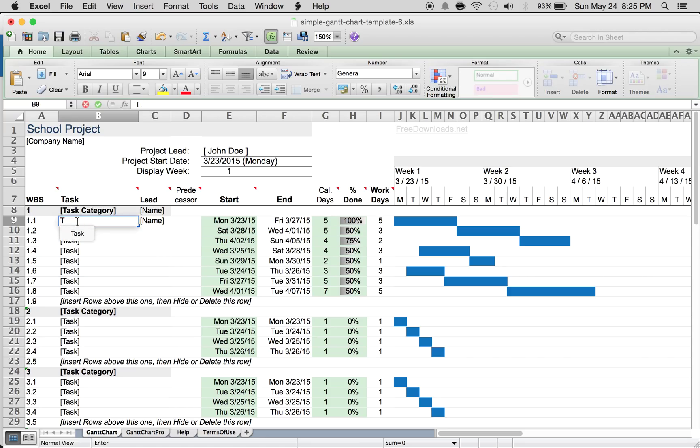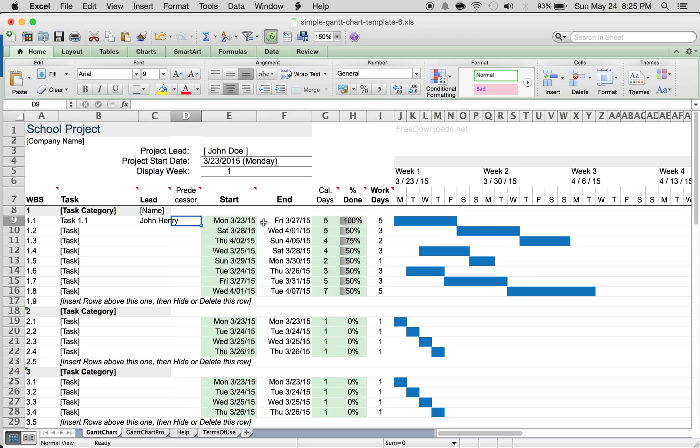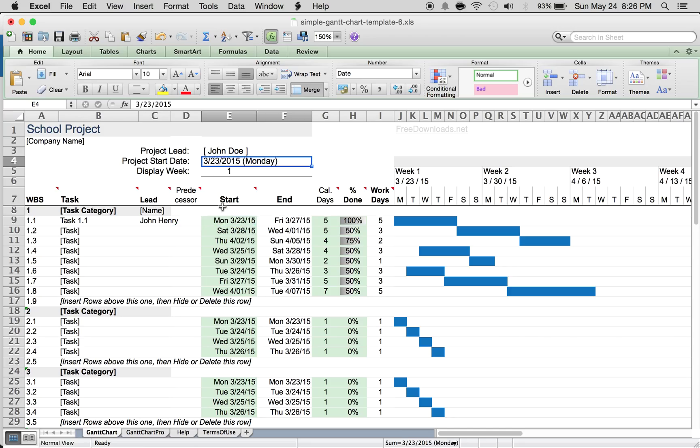We'll just call it task 1.1. For whoever the lead is, say you're assigning this to somebody else, so we'll say it's John Henry. The start date - this is actually a formula as you can see here from E4, so whatever the start date is here will show up here.